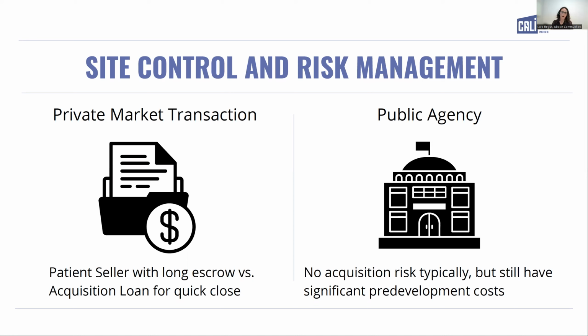So those kinds of opportunities are a little bit more financially feasible on the front end. You're still spending money on your design team, your land use team, all the other folks that you're working with to move the project through the pre-construction process, but you're not having to spend money and take on risk around owning that land. So, pros and cons to each method. It just really depends on the opportunity. But these are the two typical types of transactions that we see. Again, I mentioned earlier in the presentation the opportunity to partner with someone. You might end up partnering with someone that already owns the property, like a market rate developer or a church, and then you can have a different kind of quasi-transactional structure. Let's go to the next slide.